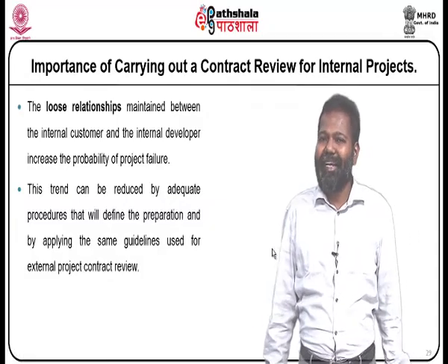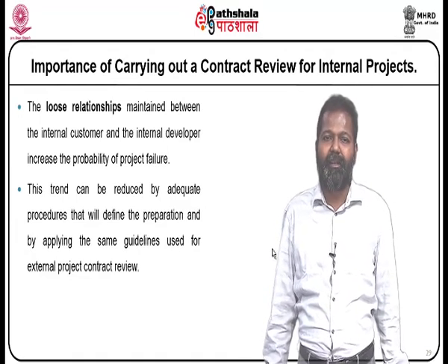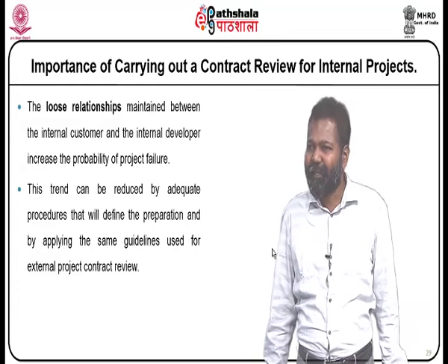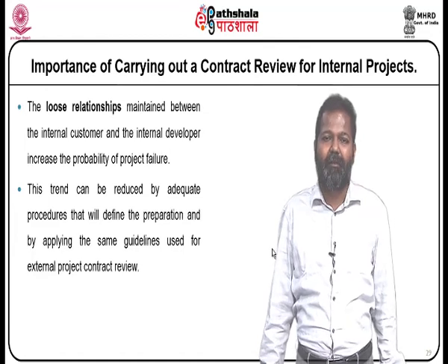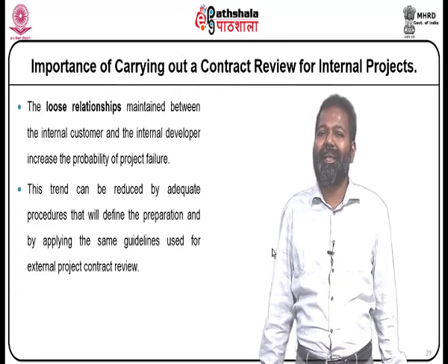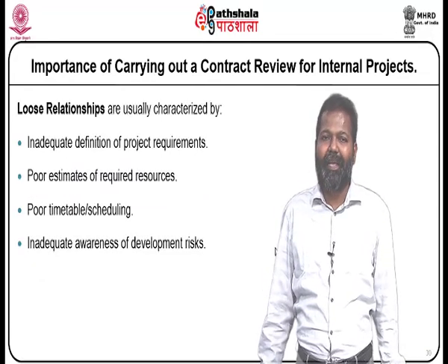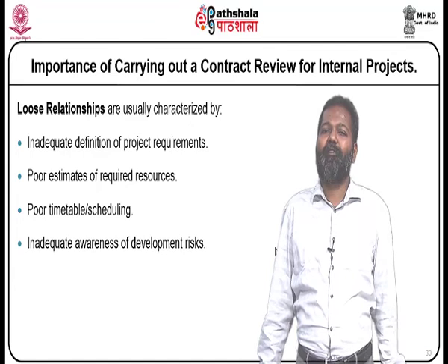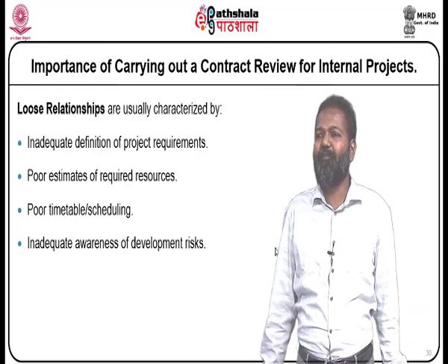What is the importance of carrying out a contract review for internal projects? The loose relationships maintained between the internal customer and the internal developer increase the probability of project failures. This trend can be reduced by adequate procedures that will define the preparation and by applying the same guidelines used for external project contract review. Loose relationships are usually characterized by inadequate definition of project requirements, poor estimates of required resources, poor timetable or scheduling, and inadequate awareness of development risks.